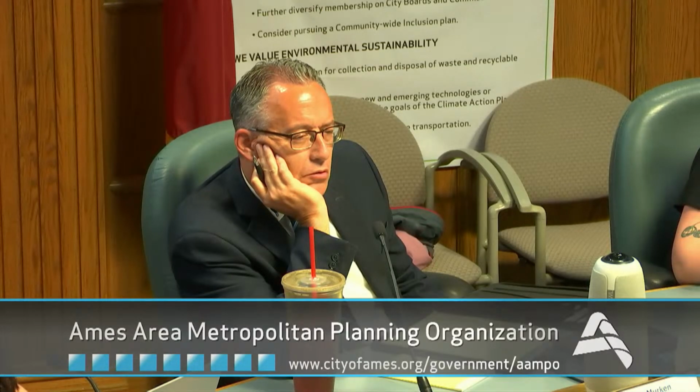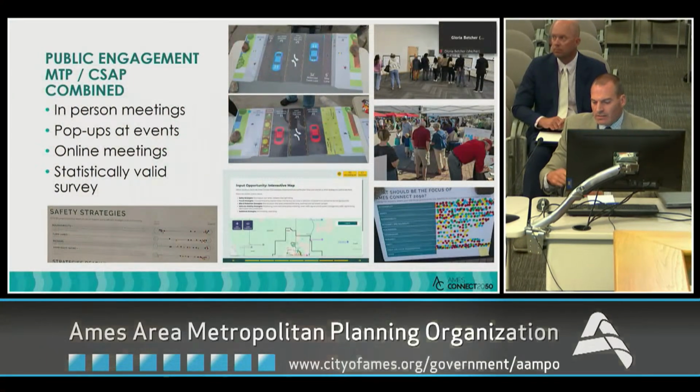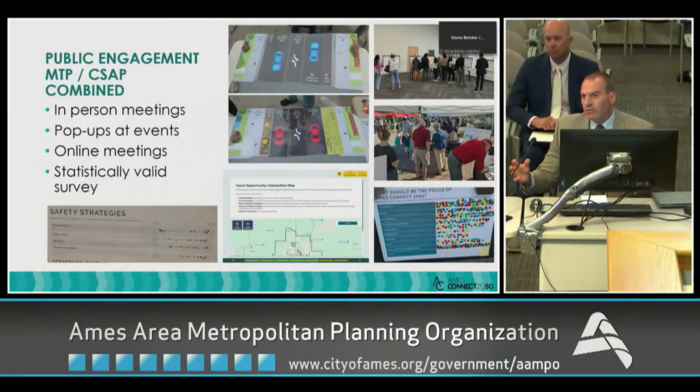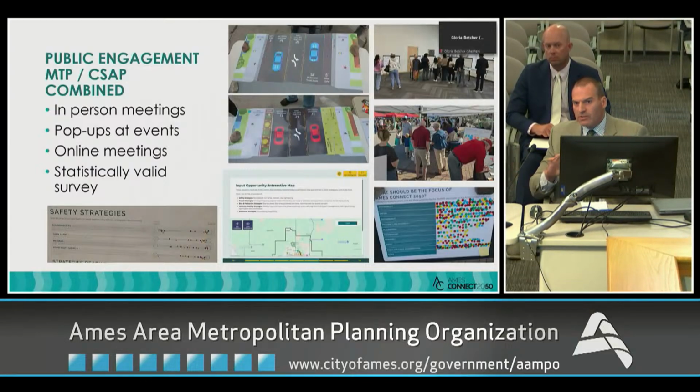I think one thing I would add to what Jason said, and I'm sorry that it's small, but in the bottom right-hand corner of the slide, because this plan is built on performance measures. So the way we rank and score things based on safety, operation, all those categories we talked about, we also ask the public in those categories, what are your priorities? And we give them a limited number of stickers, and it helps us weight all the different ways that we can score projects. And that tells us what are the high priority projects, what are the medium, and what are the low priority. So it helps us put the dollars where they need to go first, second, and third, and get the most out of the system that meets all the goals, not only of best practices nationally, but of what the local public is looking to see and what their expectations are. Great, thank you.